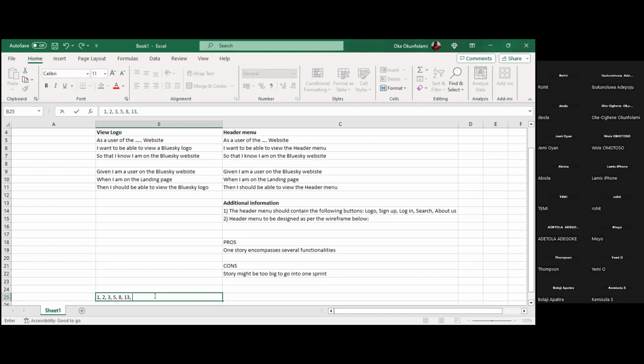But one of our own developers said, oh no, if there are 2 people working on it, on front end and back end, then you have to add their efforts together to get the estimation. You understand? So we're saying, no, it's not per person. It's about the complexity of the task that you're doing. It's not like, oh, it's going to take me this much,